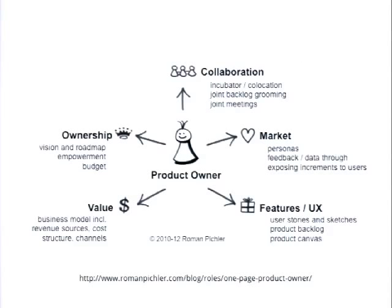Through your inception phase, you should establish roles and responsibilities. The most important person on a project is the product owner — that's what we call the client lead in Agile. Ideally it should be somebody who uses the CMS on a regular basis, not just somebody the client assigned because they want to make sure it doesn't go over budget. It should really be somebody who can stay engaged throughout the build, make decisions, and give you useful feedback. You really should expect a certain level of engagement because this is absolutely the most important person on the project — it can make it or break it.